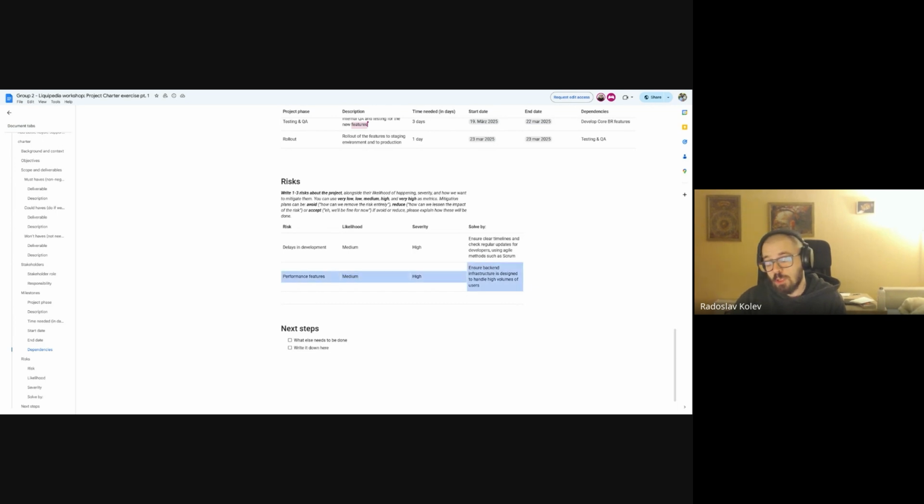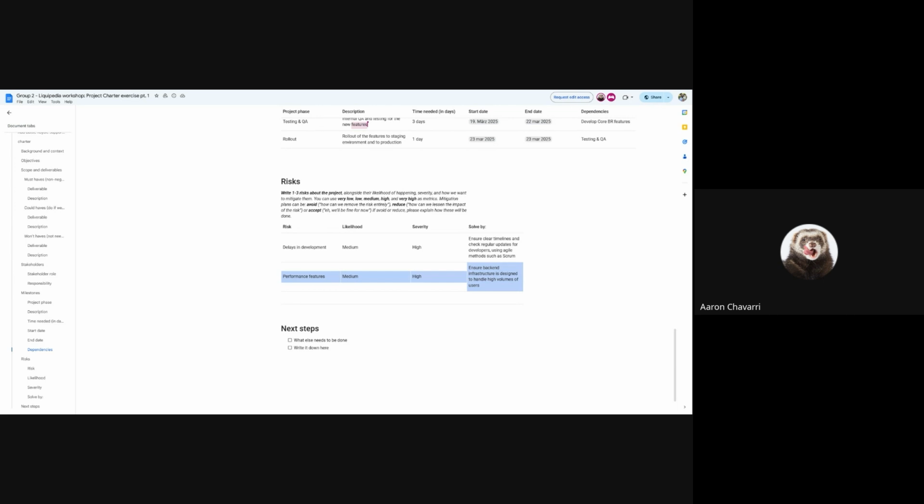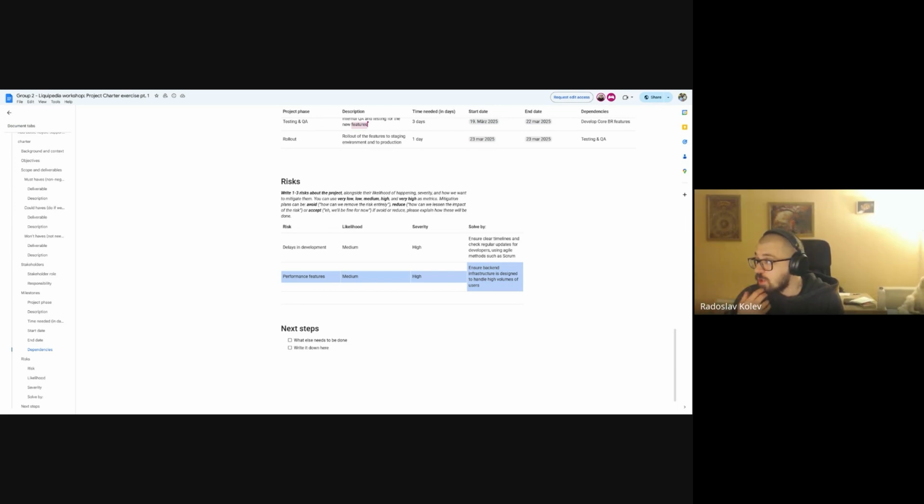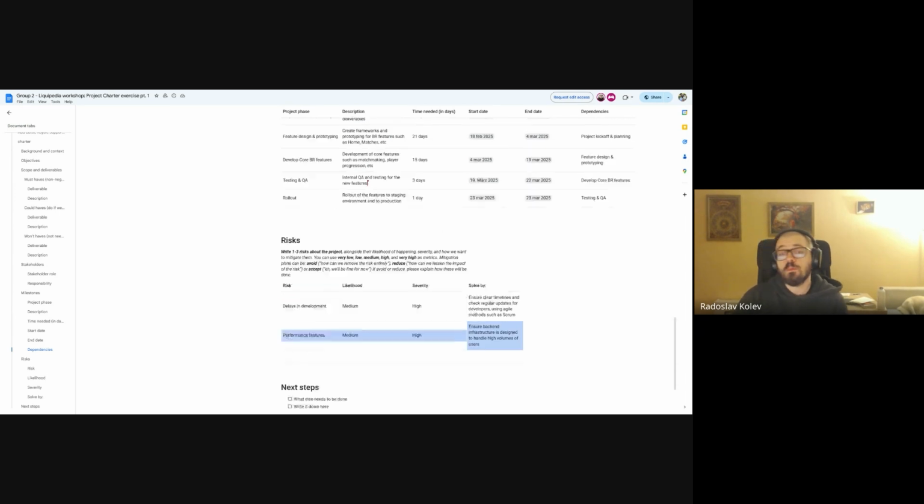This was actually a risk that we faced when we were launching the app officially. We did extensive testing to see whether we could actually handle all of these users that could potentially come. We got about 100,000 installs on day one, which is pretty nice. But we had to ensure that this actually happens. Very good, really nice.